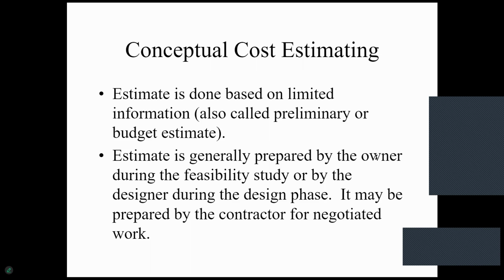Conceptual estimates are done based on limited information, also called preliminary or budget estimates. They are generally prepared by the owner during the feasibility study or by the designer during the design phase. So that answers my question: we use conceptual estimates during the feasibility study or by the designer. They may also be prepared by the contractor for negotiation work. Most of you will be project managers in the future, and as a contractor, you may need to know this for negotiation as well.